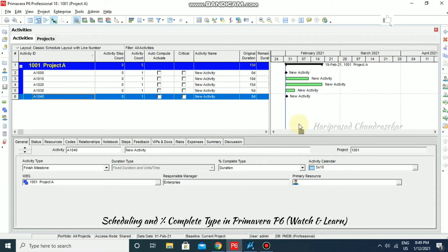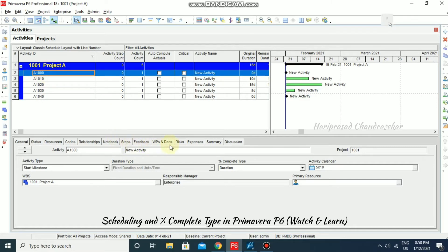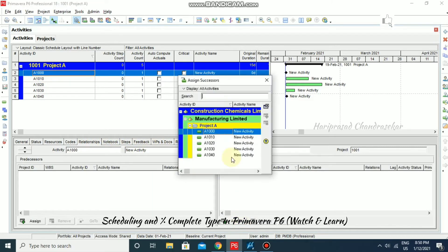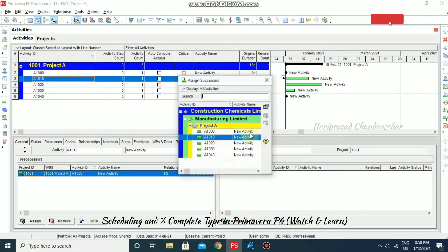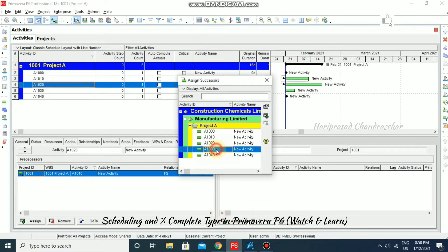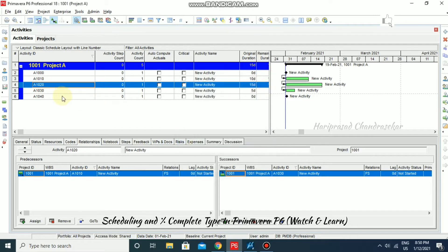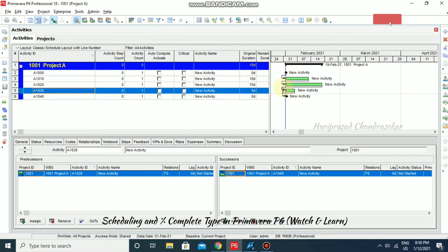These are the activities we have created. We don't have any links yet. Before scheduling we must add some links. So for A1 I'm going to relationships, going for successors, and assigning them one by one through each activity. All relationships are finish-to-start; if you want something else you can choose from here.